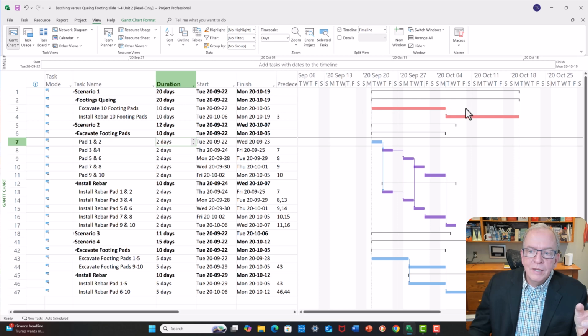Here, it's like we're done, and now we've got to go back and fix them all. That's not great. So you always have to think about the feedback loop, and if we can shorten the feedback loop, that's going to be great. If we can shorten the batch size, because the other thing is, how much work in process do we have when we do this, as compared to this? We have a lot less work in process. Using smaller batches means a lot less work in process.